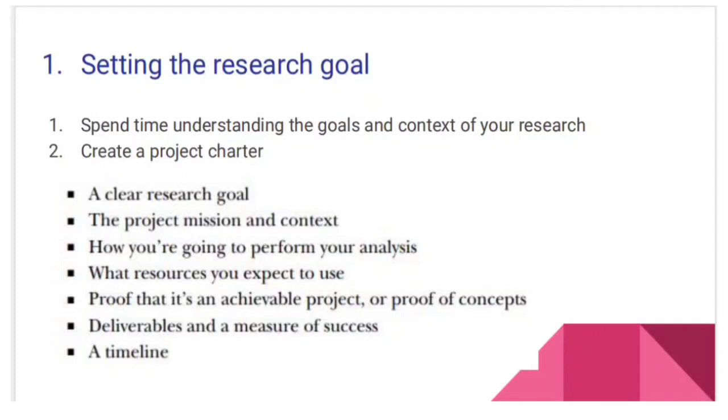The project charter must have a clear research goal, the project mission and context. How we are going to perform your analysis. What resources you expect to use. Proof that it is an achievable project, or proof of concept. Deliverables and measures of success. A timeline. So these are the things the project charter must have.